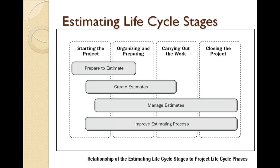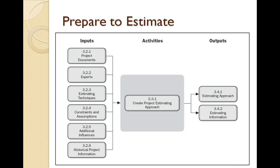The next phase is creating actual estimates, wherein the team works together, sits together, creates estimates, provides them to the customers, and tries to get approval. The next phase, which spans pretty much the entire project, is managing those estimates — checking whether we are going as per our estimates, whether plans and actuals are meeting, and refining estimates if the environment, scope, or project characteristics have changed. We also need to think about improving the estimation process — how our organization's estimation process is being executed and whether there are opportunities for improvement. These are the various phases in the estimation life cycle.